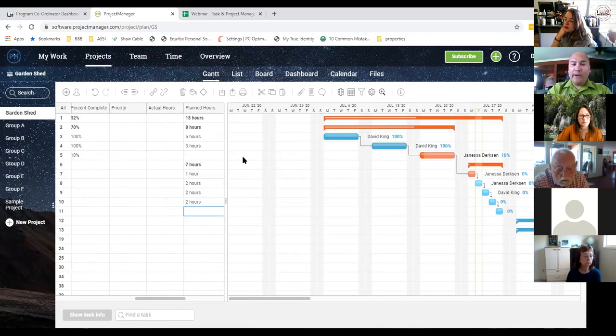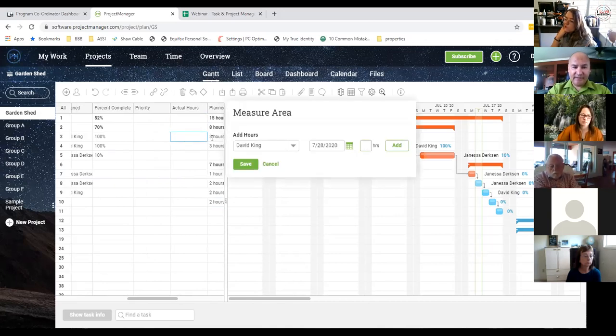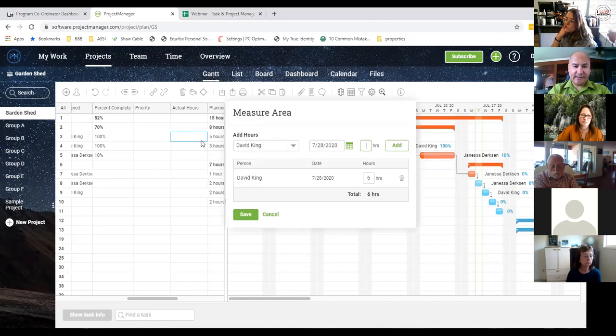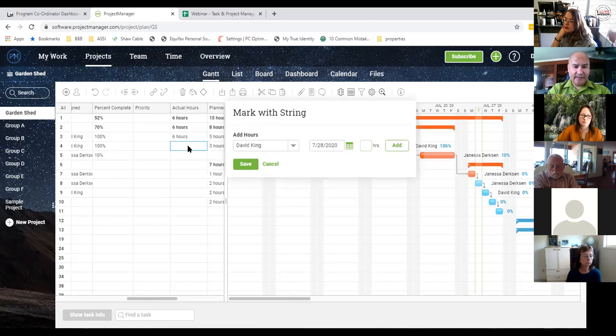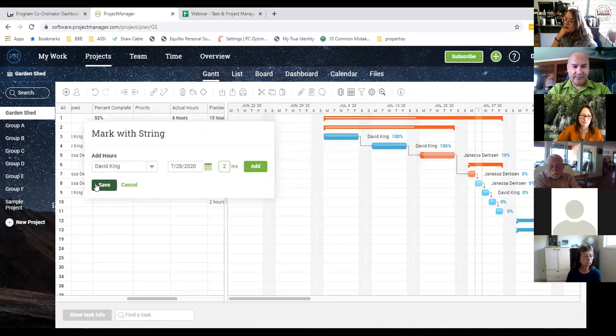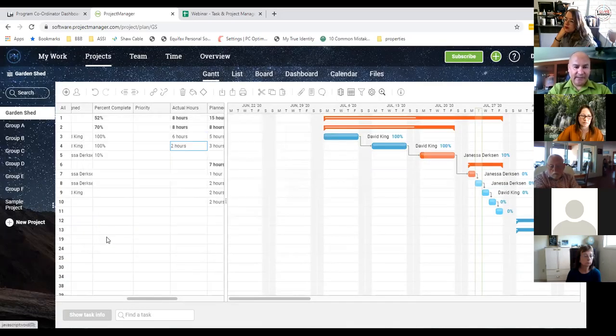When I actually finish a task, though, I can put down what my actual hours are. So this should have taken me 5 hours. It actually took me 6 hours. I'm going to save that. This should have taken me 3 hours. It only took me 1. Oh, no, I can't. Come on. Mark with a string, actual hours, 2 hours. It won't let me do 1. Look at that. Don't cancel, no. And I'm going to save. Great. So this is your planned versus your actual, so you get good metrics on this one.